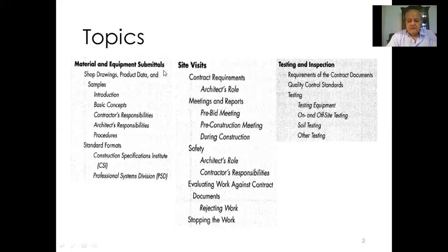So there is what we call a pre-bid meeting, before the contractors submit their bids, and there is a pre-construction meeting. So you meet with the client and the contractor to prepare the construction stage and hand over the site to the contractor. And there are several visits during the construction. And as we say, safety is first.